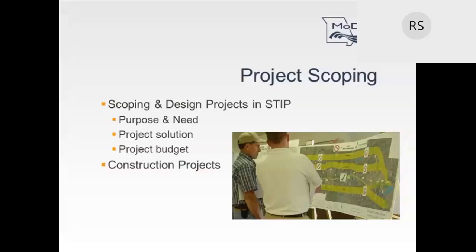Our goal is to get these projects scoped to a point that a solution is identified and a good estimate and schedule has been established. Once this is achieved, the project will be considered for addition to the construction program. Once a project is added to the STIP for construction, it is considered a public commitment.